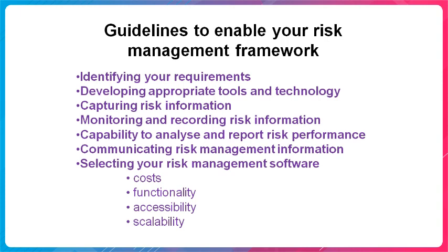Then we see capability to analyze and report risk performance. To effectively analyze and report risk performance, one will need tools and technology that analyze risk based on quantitative or qualitative parameters. Qualitative risk analysis will require tools that have the capability to classify risk according to categories, impact and likelihood. Quantitative risk analysis will require tools that have the capability to calculate and or simulate value of risk.